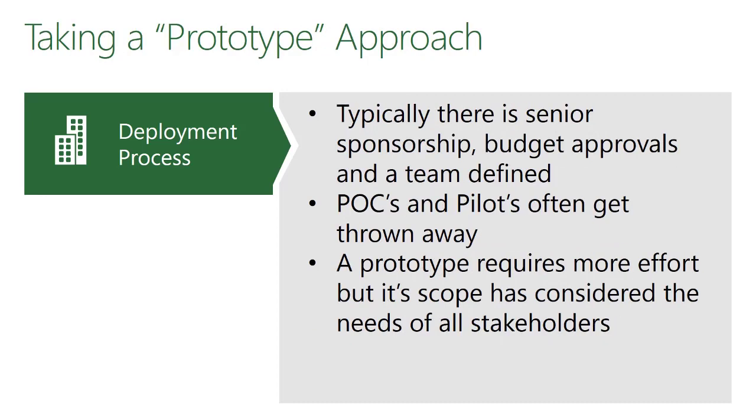When you think about initially deploying the tool, think in terms of a prototype. This is where you are bringing in the appropriate individuals to make sure they sign off on the implementation, and you want to think in terms of a prototype largely because the tool is completely blank. There's no configuration settings within it. There's nothing there. So it's hard to run a proof of concept without anything to really measure, right? So taking a prototype approach means that you can take what you've discovered and move it into your actual implementation.